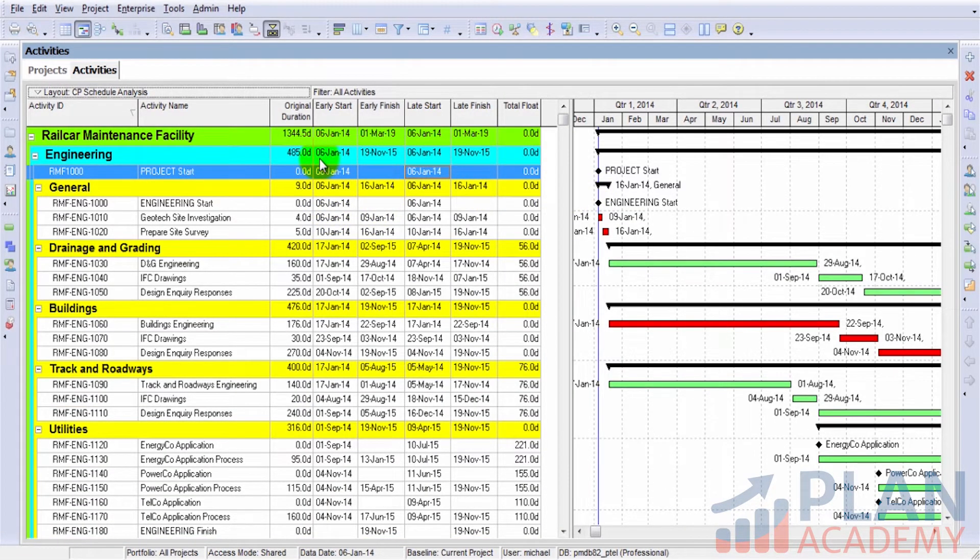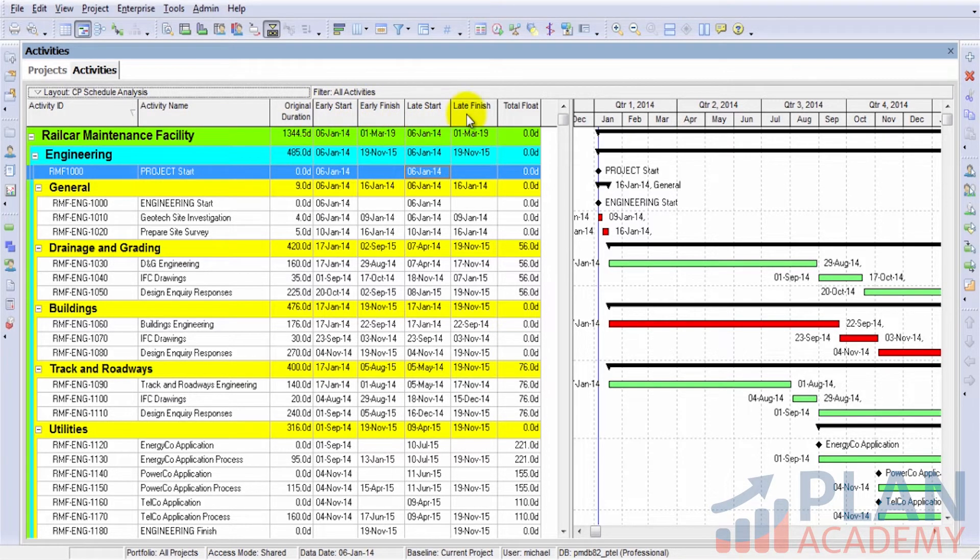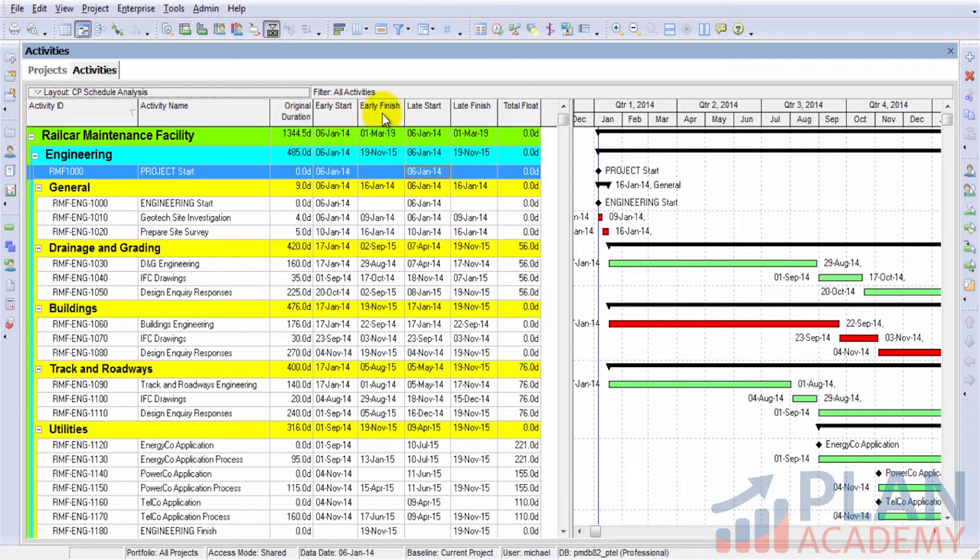And opening this layout, what we'll notice are these four date fields here: my early start, my early finish, my late start, my late finish.